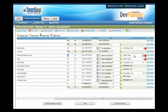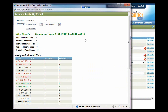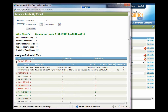If you over-allocate someone, notice that a red exclamation point will show next to their name. Once you click that, it'll take you to a resource availability report. The resource availability report will show you day by day how you have this person allocated. If you've over-allocated this person on a specific date, it'll turn red. If you click the plus sign, you'll drill in and you can see the details that make that up.